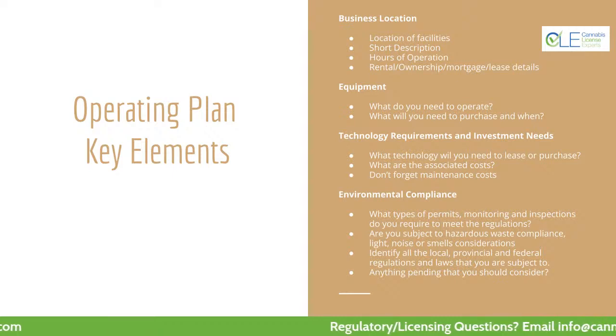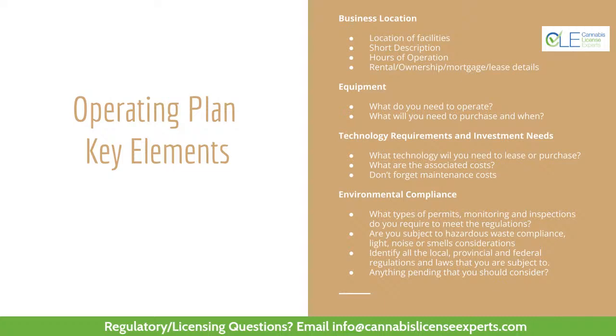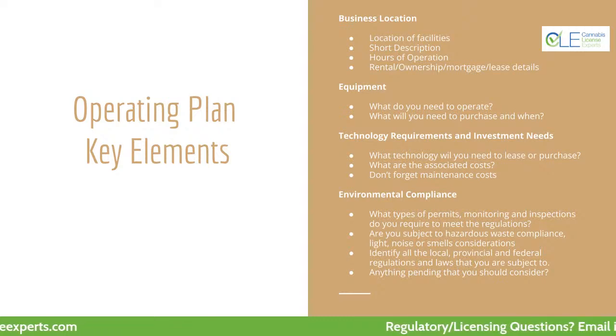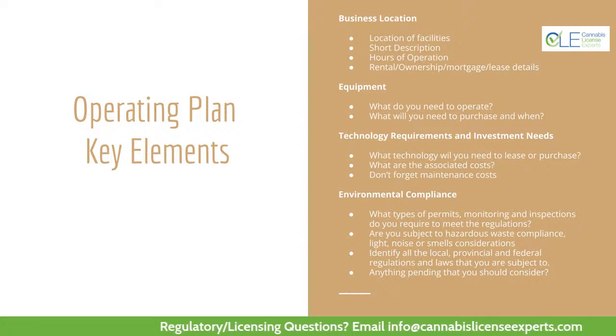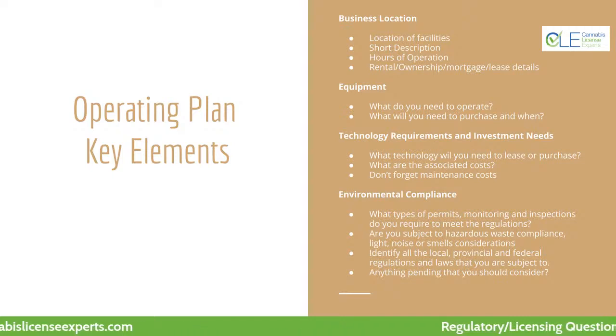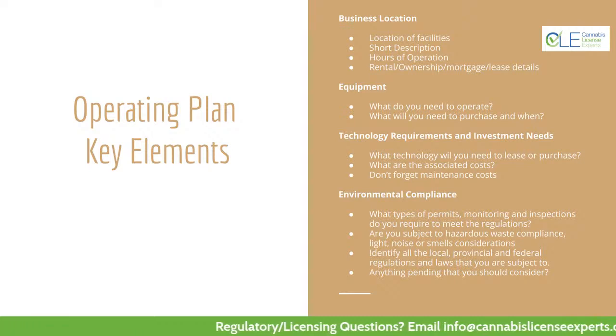Another piece of advice that I give all of our clients is always think about worst case scenario, especially when it comes to funding. Seek that. And then if everything goes wonderfully, beautifully, smoothly, you get your licensing faster than expected, that's additional money in the coffers for areas that you didn't think you necessarily had time or money to venture into immediately. Or you might just want to hold on to that as a contingency fund for unforeseen factors.